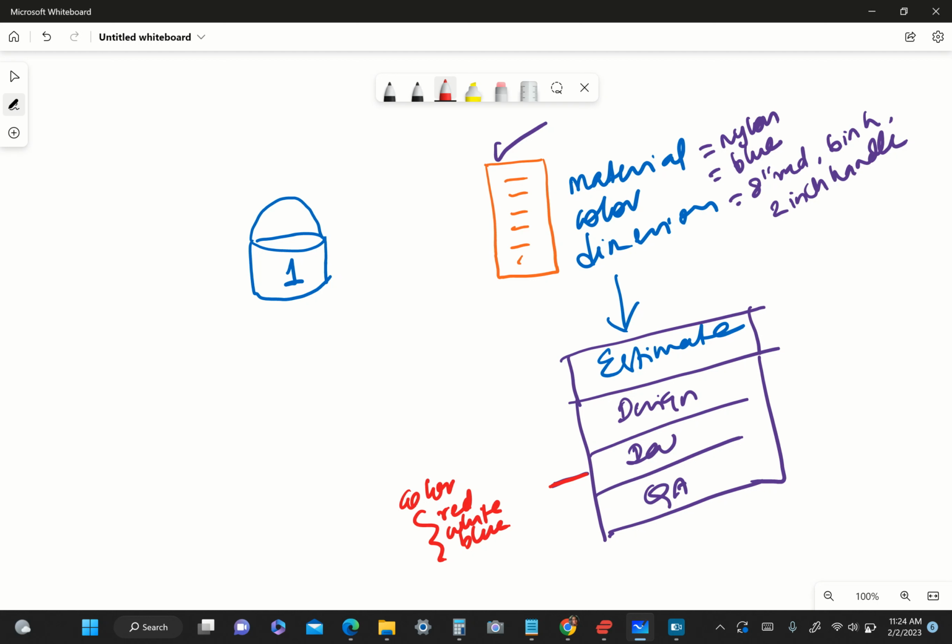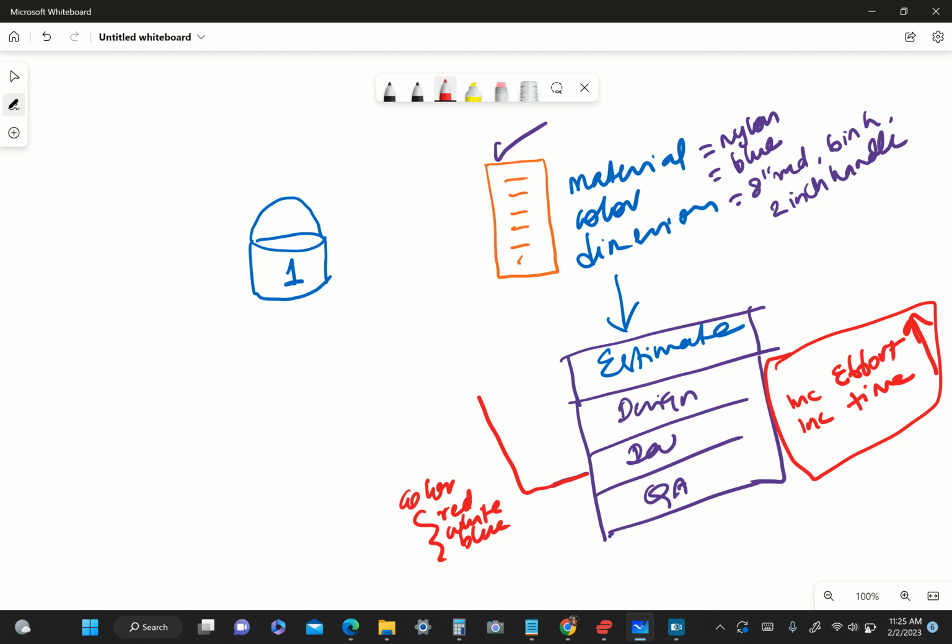If we just directly say okay, and the developer continues, it is going to increase the estimate and increase the time, right? The developer's estimate will change, and there will be other costs associated with it. If this was already tested, the QA has to repeat their testing, and so on. Anytime anything changes the estimate, your effort or time, if it increases, it has to go through a change approval process.